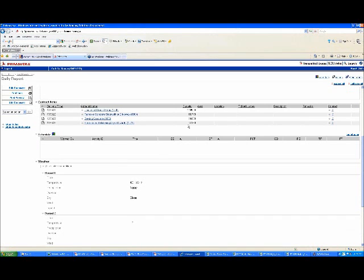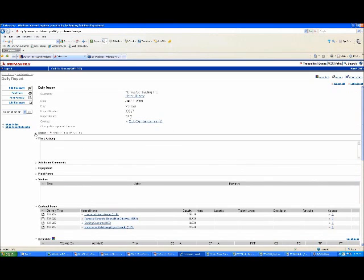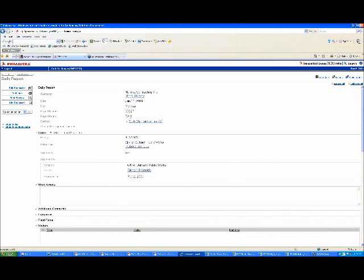In the approval process, our inspectors pick up the daily reports and approve them for payment, and at the end of the month they get rolled into the payment requisition automatically. And the other cool thing is that the totals of those payment requisitions then get pushed to the P6 schedules. I think we touched on that last time in part 1.